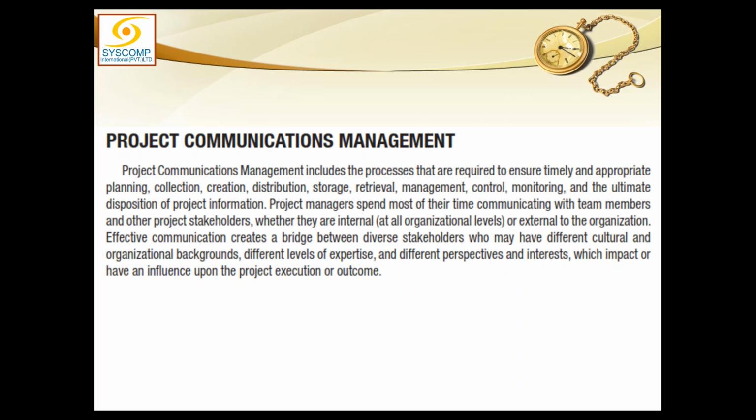And by reversing, I mean most of the communication should be written and some of the communication can be verbal. Now, if that be the case, then more than 50% of the communication must be written. So generally, it is said that 55% of the total communication must be written, remaining 45% may be verbal. This percentage is set just to ensure that more of it is documented, right? Do you get my point?